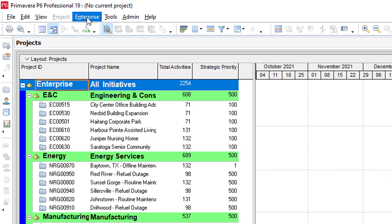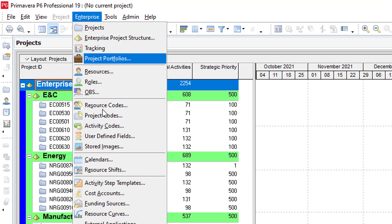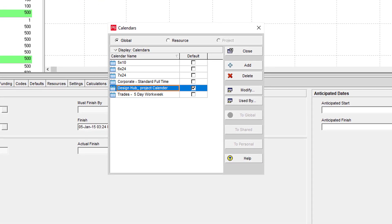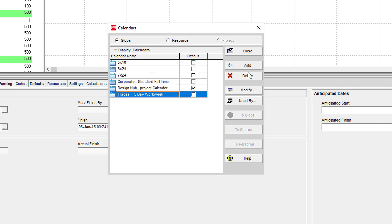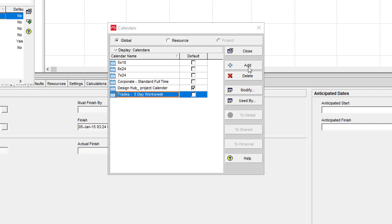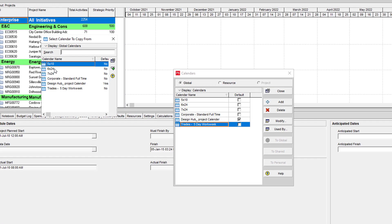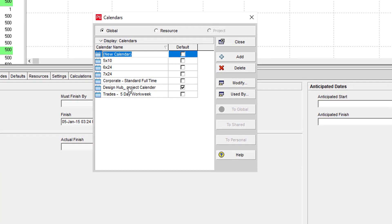Now we are in the fourth step: we have to define the working calendar as per our project. Our project is EPC type; in this we have site construction, which is mostly 6 days a week. First we copy the standard 5-day working calendar, then we will modify it.